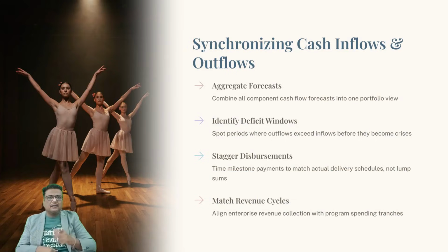Let's dive deeper into how we coordinate the timing of cash receipts and disbursements across all constituent projects so that cash is never sitting idle or running dry. According to the official study guide, portfolio cash flow management requires aggregating component cash flow forecasts, identifying cash deficit windows, and timing milestone disbursements to match enterprise revenue cycles.